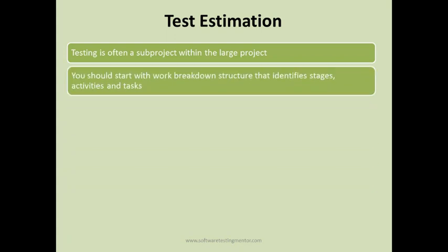You should start with a work breakdown structure that identifies stages, activities and tasks. So in order to do test estimation, because testing is a sub-project, you need to estimate how long it will take or what efforts are required to achieve the testing cycle, to achieve all the test tasks.